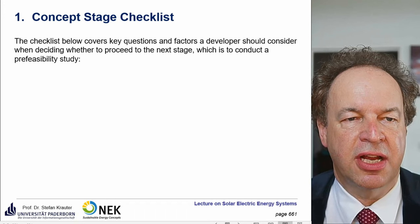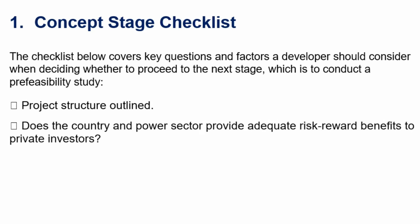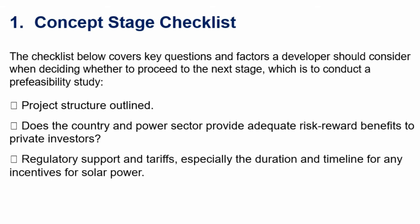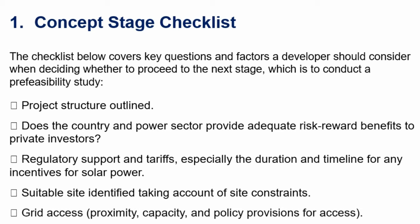Now the checklists — starting with the concept stage checklist for the pre-feasibility study. The project structure has to be outlined. Does the country and power sector provide adequate risk-reward benefits to private investors? How long is the support valid? Regularly check support and tariffs, especially the duration and timeline of any incentive for solar power. Suitable site, taking account of site constraints. Grid access — proximity, capacity, and policy provision for access.